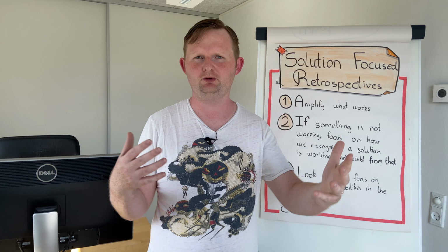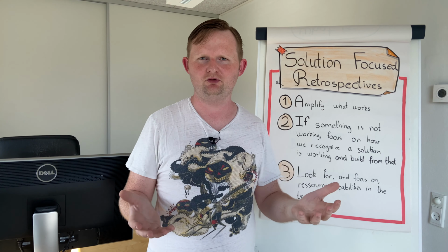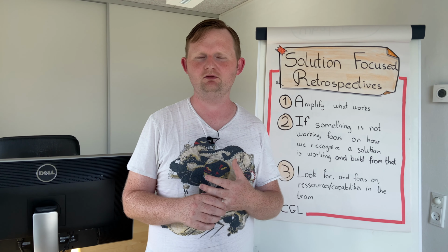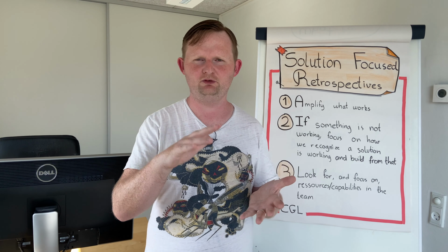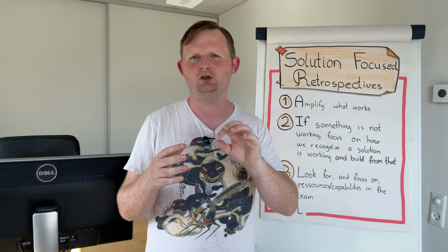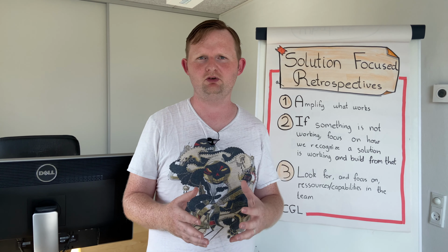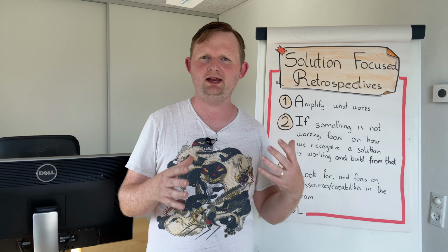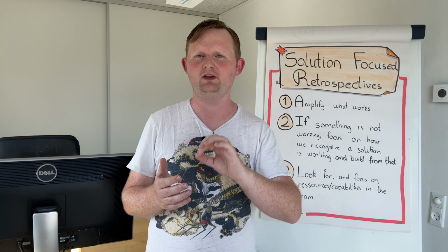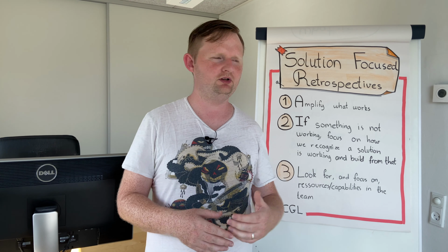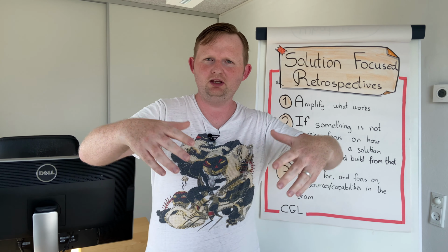a problem with merge requests being ready for too long time and we don't focus on that, then focus on identifying how can we see that it's not a problem anymore. It could be that our control chart is flatter, that we don't have small dots on a board saying that this has now been here for 3 stand-ups or whatever. But focus on that and then figure out what actions do we then need to take to make sure that these changes happen. And again, when that starts to work, then amplify that. Amplify how can we make sure that these signs occur in an even broader scale.